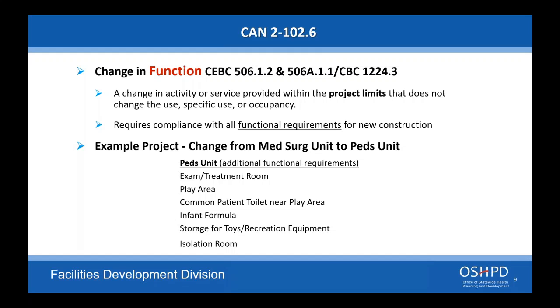What you do is you add all the procedures that are being done in the room in the functional program. It's actually already a requirement, but a lot of people skip over that portion.